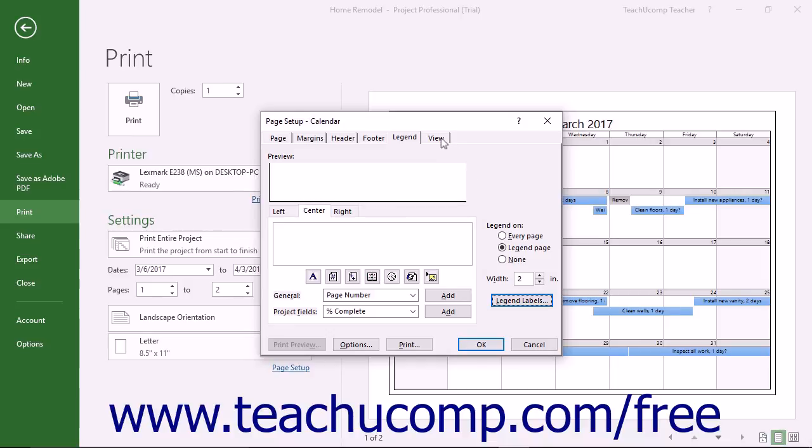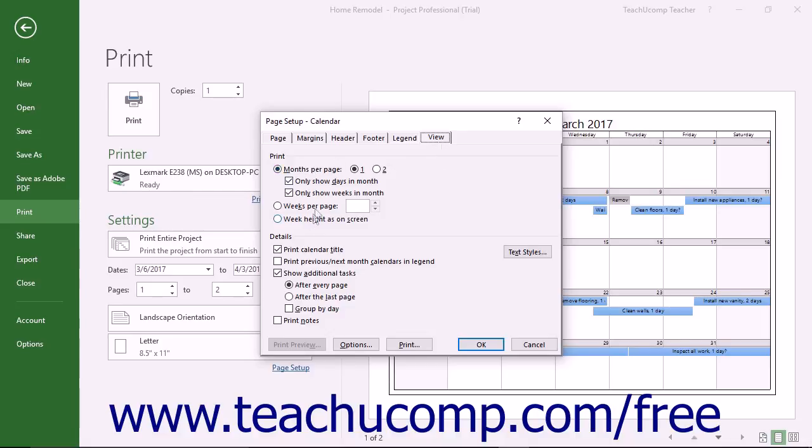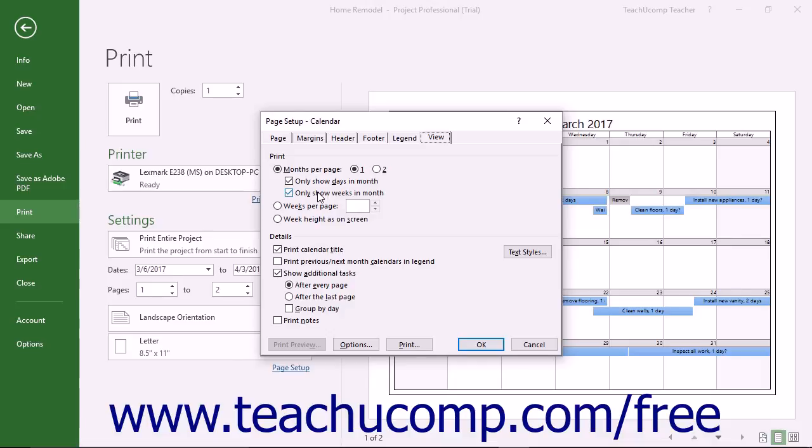You can then click the View tab to set any special settings for the specific type of view you are printing. For example, if printing the calendar view, you will see options on the View tab for printing the months and weeks within the view. If printing a Gantt chart view, you will see options regarding the printing of columns. The options shown on this tab will vary depending on the view selected, so you should always check the options available here when printing your view to be sure it prints exactly the way that you want it.